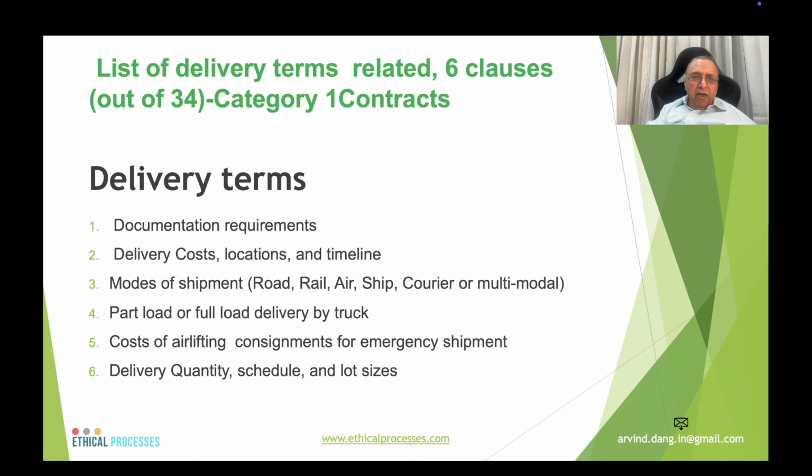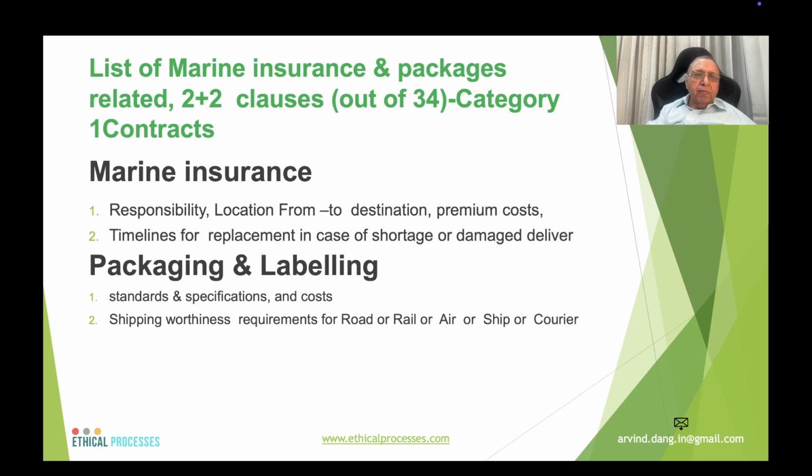Part load or full load delivery by truck, another cost element. Cost of airlifting assignment for emergency shipment, and delivery quantity, schedule, and lot sizes for such air shipments. Marine insurance: responsibility, location, from to destination, premium, who will bear the premium, and timeliness for replacement in case of shortages or damaged delivery.